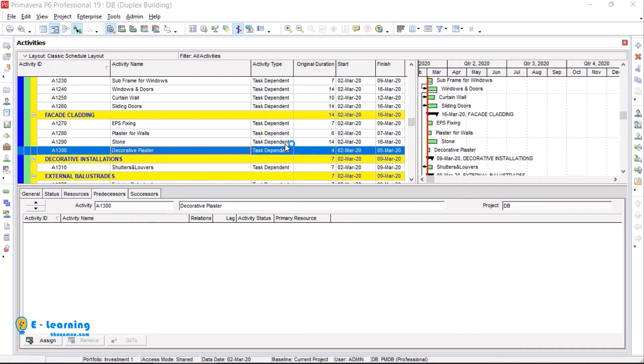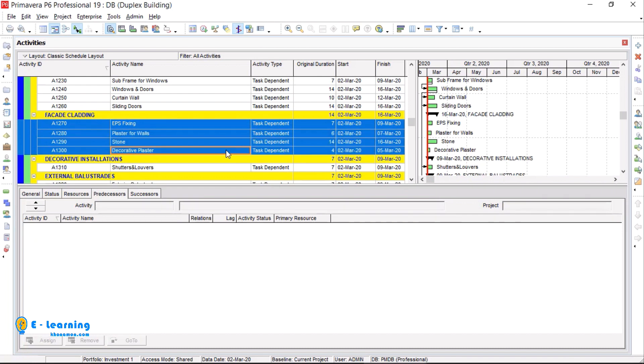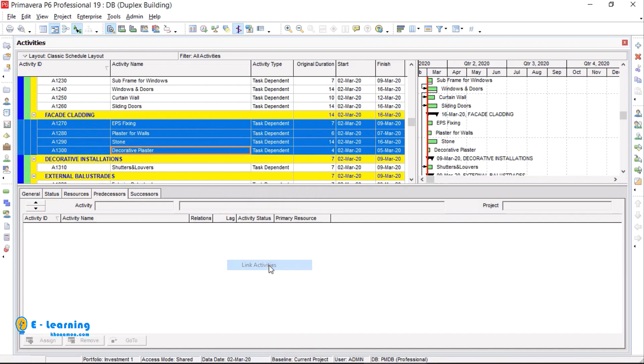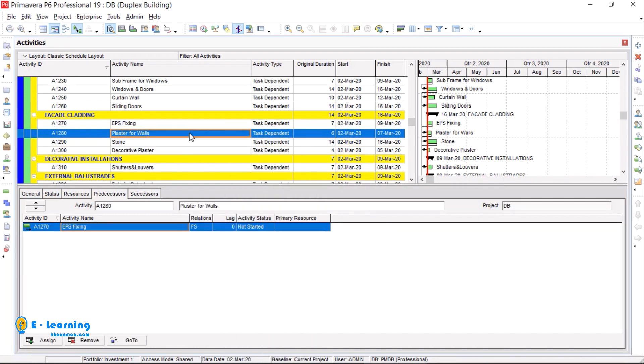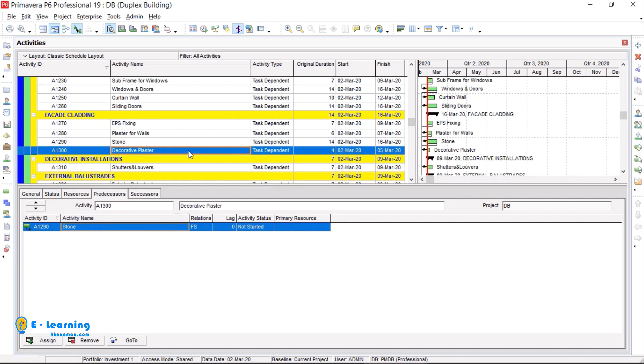If your activities are linked together in a hierarchical manner, for saving time, you can select the activities with pressing shift in keyboard. Then right click on one of the activities. Click on link activities. In default, it is finish to start relations. You can change it anytime. This is a trick just for saving time.